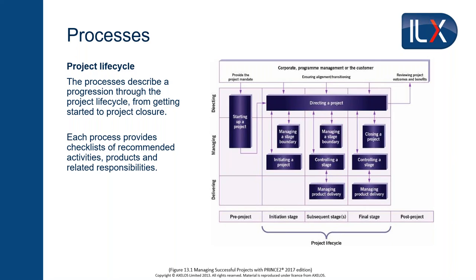For a controlled start, there are two processes. Starting Up a Project is pre-project preparation — a quick check: is there a worthwhile project, should we spend any real money on this? The manual says spend the minimum amount of time here. It produces something called the project brief and a stage plan for the first stage, initiation. This goes up to the project board in Directing, which asks: do you want to authorise initiation? If they say no, the project never existed — it's not worthwhile, let's not waste time and money on it.